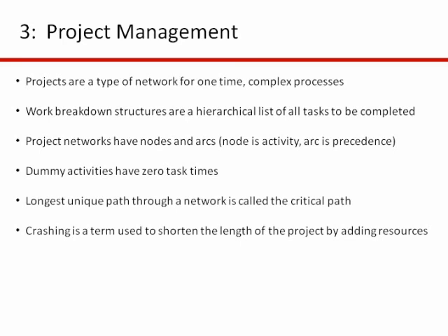We're going to represent projects with networks, and networks are like processes. They have nodes and arcs, and so we're going to use the activity on node representation of our networks. So each node or circle will represent an activity that needs to be done. And then the arrows or the arcs will indicate the order that the activities need to be done. We won't really need to worry about dummy activities because we're not going to be dealing with activity on arrows, and that's something specific to that type of convention. So I wouldn't worry about that fourth bullet point.